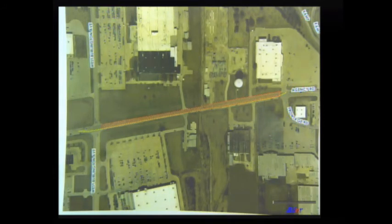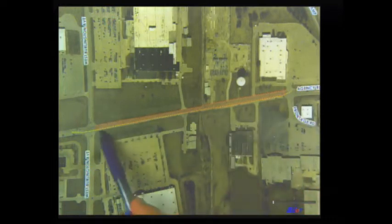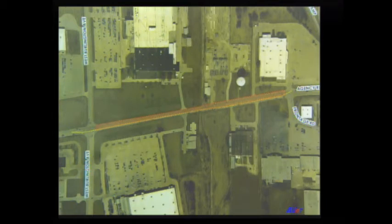This is a map I did, so pardon the crudeness of it. I just wanted to bring to attention, we had pre-construction for Agency Street last week. On July 20th, you'll start to see cones and delineators and barriers and the whatnot headed out to Agency Street. So what they're going to do is bring westbound traffic into the southern lane. So you'll have 1 lane each way on the south side. So as you can see, it drops it across through both the frontage road and the West Burlington Avenue intersection. I've talked to West Burlington. Once I have some better traffic control plans, I will forward them on to both West Burlington agencies and then ours to let them know. We're also going to probably put some information that's a little bit more thorough than this on the website and Facebook. So just wanted to make you aware, and July 20th is the date that they'll start putting some work out there.